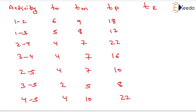Activity T0, Tm, and Tp are already given in the question. We have to determine the value of activity time, that is Te. It will be equal to (T0 + 4Tm + Tp) divided by 6 — that is the formula for Te.